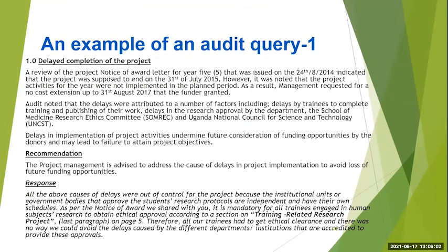So we had PhD students, we had master's students, but you know, the IRB, the National Council for Science and Technology, they usually have their schedules. Even if your trainee has a complete proposal, perhaps approved by the department, they have to wait until the IRB schedules such meetings for the researchers to present their work before the Research Ethics Committee.